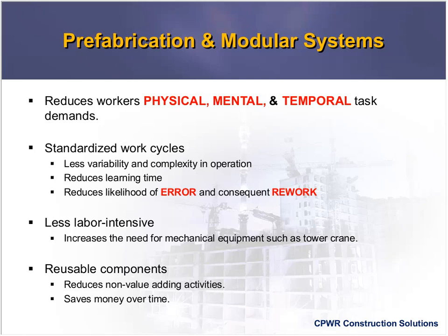And then we reduce the likelihood of errors, which means we are controlling rework in our project. And as you know, rework is just a waste. In lean construction, we try to minimize the waste and minimize the rework, because rework means just double utilizing our resources, project resources, from a time perspective. Time is money, so we are losing a lot of time. And also, we need to send our workers back to the job site to fix the defective part. When they are trying to remove and fix the defective part, they are, again, exposed to safety hazards unnecessarily. So that is another contribution to our workers' health and safety.